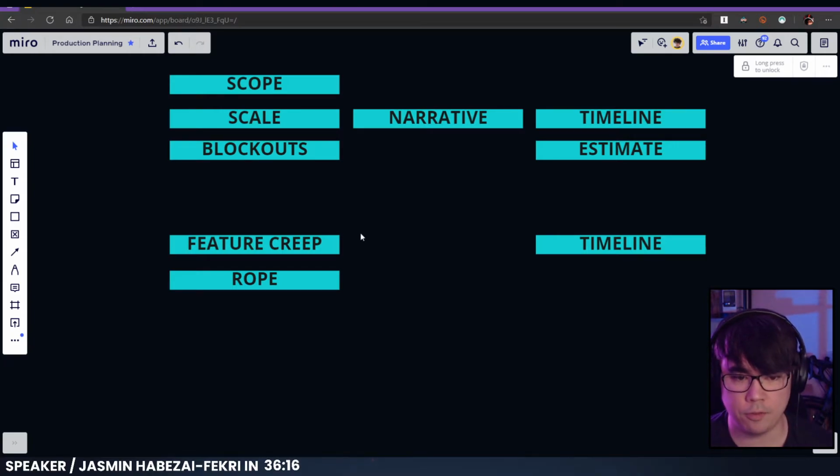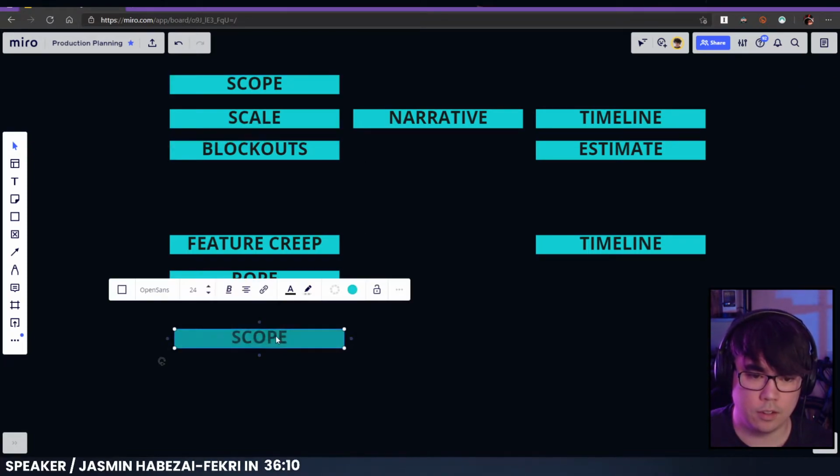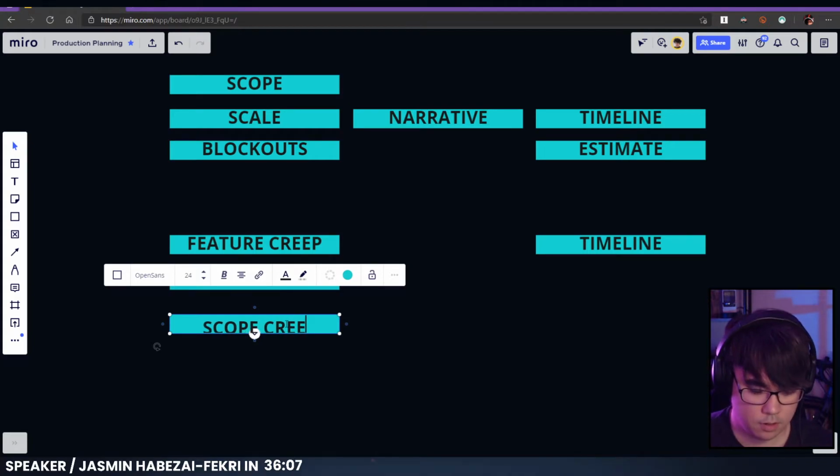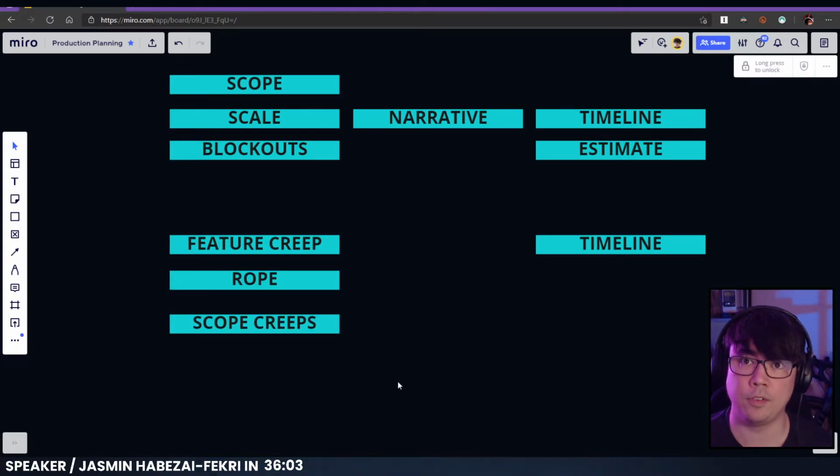But it can also happen without features moving around much, right? So when you start to get scope that creeps, that's usually a sign of a lack of understanding of the end goal. If you don't know what you want it to look like and how you want it to feel visually, when the artist jumps onto it, that's when you can get into a situation where the artist will work on it, it'll be done and it looks pretty cool, but it's not exactly what was wanted, right?